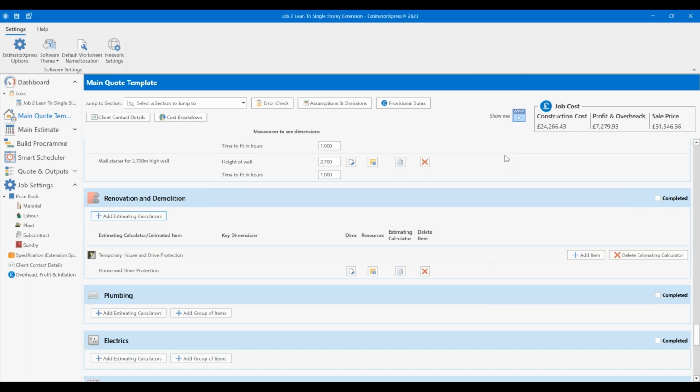There we go. Bit of extra cost in there. And things that you might be having to buy anyway, or you don't even think about, even comes into your costs, might be coming out of your overheads because you never considered to add it to the job. You just buy it regardless because you might need it, in which case, you should be charging the customer for it.